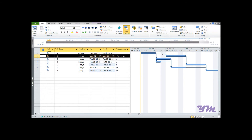You can see there is a gap of two days — actually shown as four days on the chart because Saturday and Sunday are considered non-working days per the current calendar, so it adjusts by about four calendar days, but the actual working lag is two days.